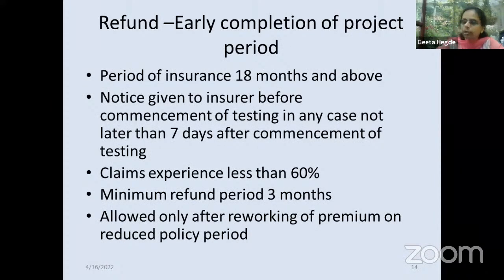Now, refund for early completion of the project. There is a provision for early completion of the project. And what are the conditions for early completion of the project? Period of insurance is 18 months or above. So for less than 18 months, refund for early completion of project is not allowed. Notice must be given to the insurer before commencement of the testing.